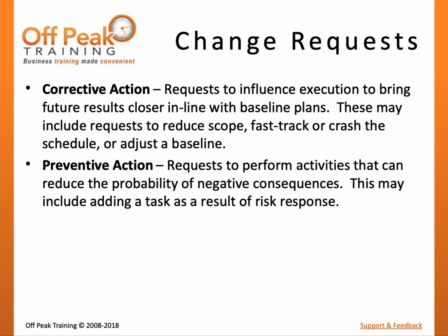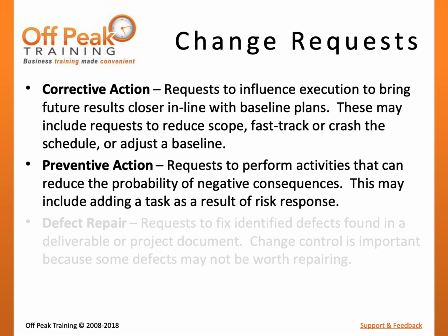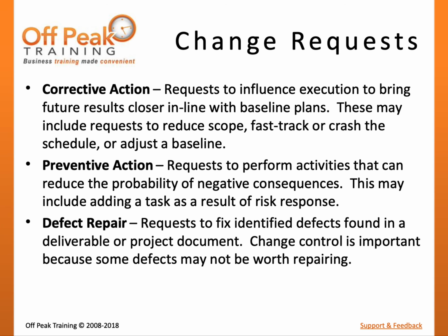Preventative action are requests to perform activities that can reduce the probability of negative consequences. This may include adding a task as a result of risk response. Defect repair are requests to fix identified defects found in a deliverable or project document. Change control is important because some defects may not be worth repairing.